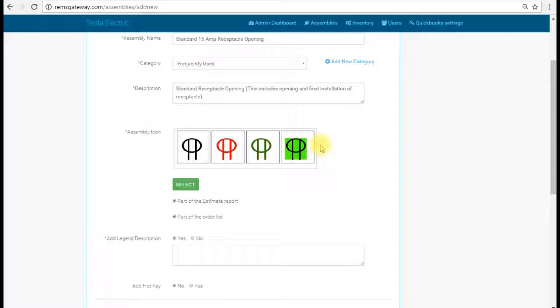Say you have a plan that comes in where the builder has already given you an electrical design. You're going to use transparent mode to place over the top of what they've done so that you know that you've counted it on the plan to get an accurate material count and to build your estimate and invoices. So that's how that works. But with a green background like that, it means that it's going to show invisible on any PDF that's printed out.